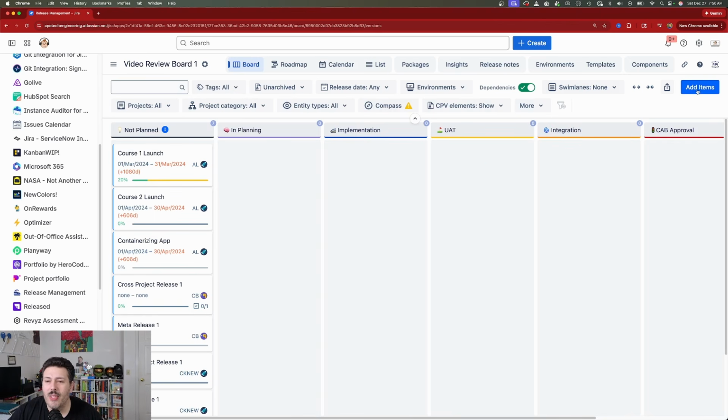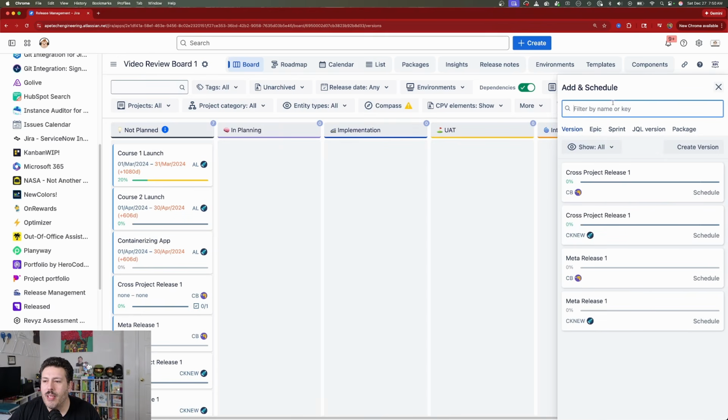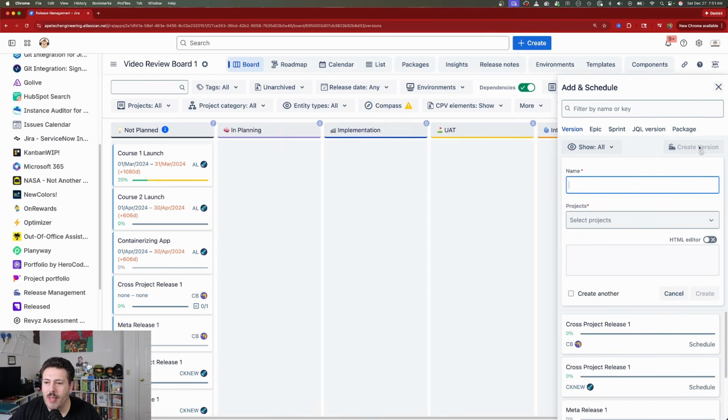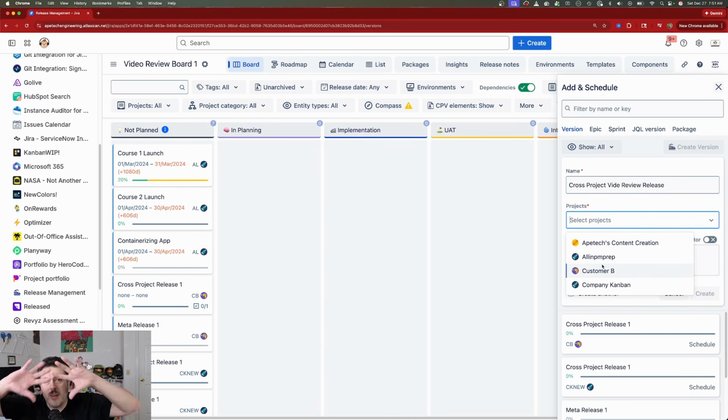So what we're going to do here is click on this Add Items button up here in the top right corner, and we're simply going to create a version. And when we create this version, there's going to be my cross project video review release. And then I'm going to select which projects this is going to go into. Now you can notice that only the projects that we selected as part of the scope of this board is what's going to show up. So we're going to select the ones we want to make it in.